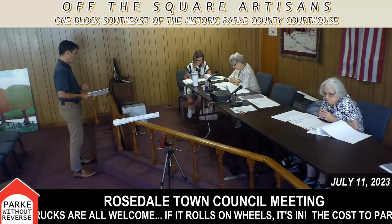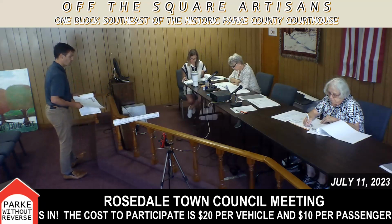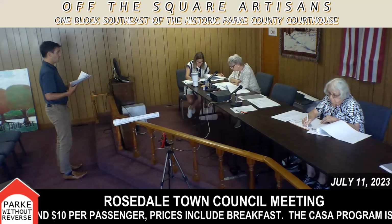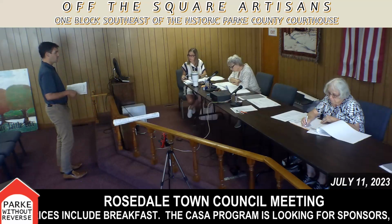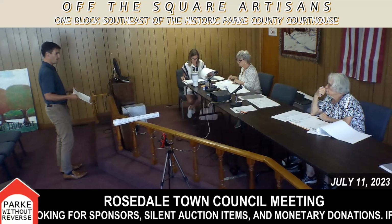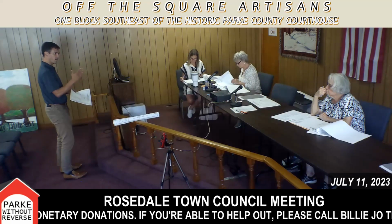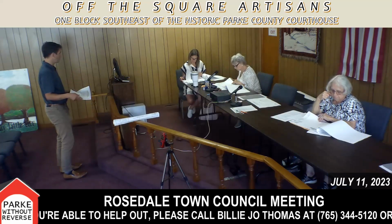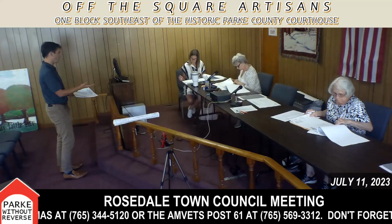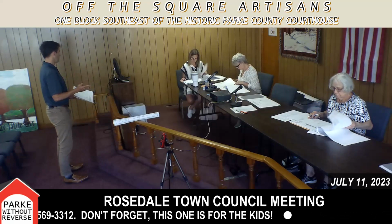So that's our only location of right-of-way concern right now. So then that's kind of the changes that I have from what was originally presented. As far as the cost estimate, we presented $625 with that original plan. Right now, we're sitting at $629 with this plan. But again, as I said, that grouted riprap area has a little play, and we still have to get the exact location of our storm sewer. So once we get the storm sewer finalized, then we'll shrink the grouted riprap accordingly. And $4,000 in that area is relatively small.